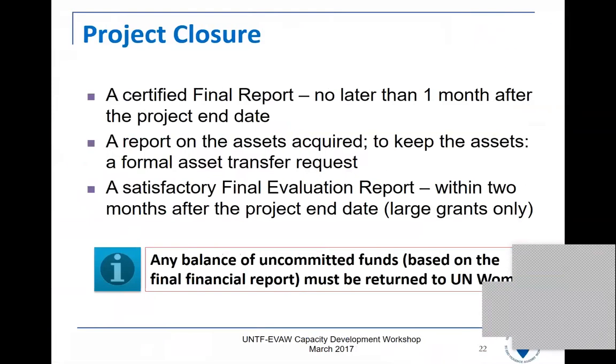So what happens when you come to the end of your project? Well, it seems a long way off, but we will ask for a certified final financial report as well as your final narrative and results report no later than 1 month after the project ends. That will cover the entire project in terms of the narrative, but the financial report will cover the last 6 months. In addition, you will be asked to have a report on the assets you've acquired. So do keep a record of any assets, any equipment, and so forth.